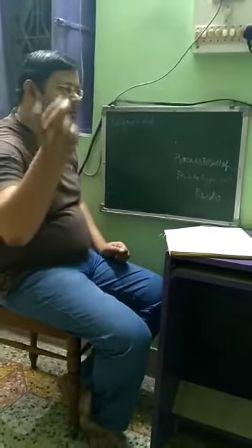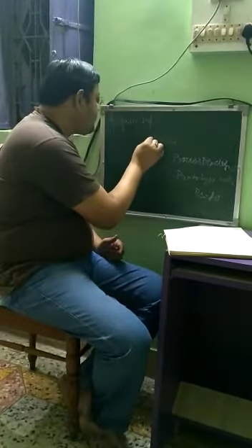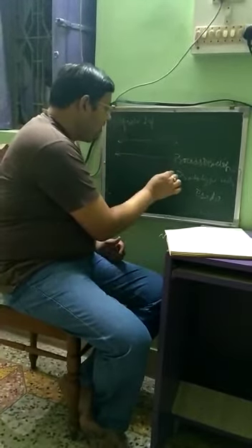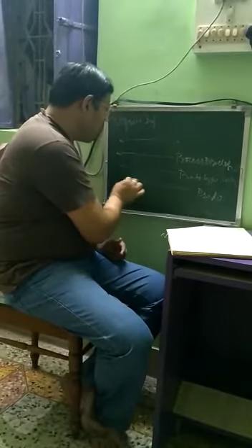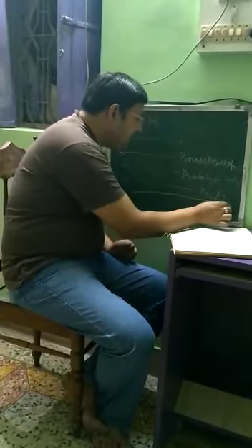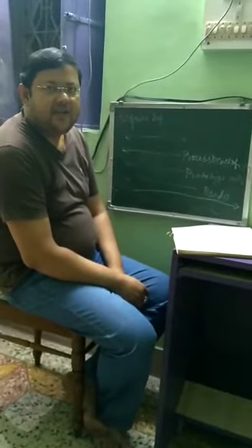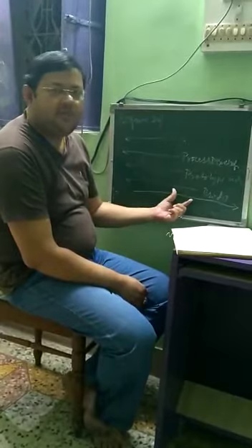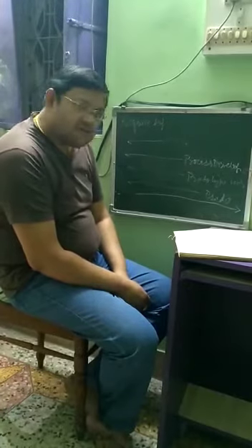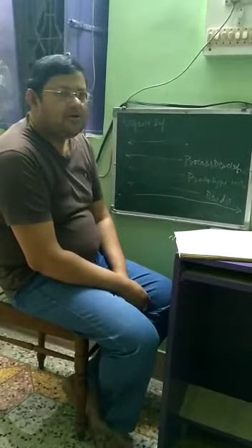So if you take the last diagram into consideration and you just place these things below like this, it comes here, it comes here, so you will see that this part from here to here, it is the lead time or the manufacturing lead time, which is the saved lead time, and which helps in the floating of the product into market, which reduces the time and helps in the capturing of the market. So this is the new approach, and it is known as the approach of concurrent engineering or simultaneous engineering.